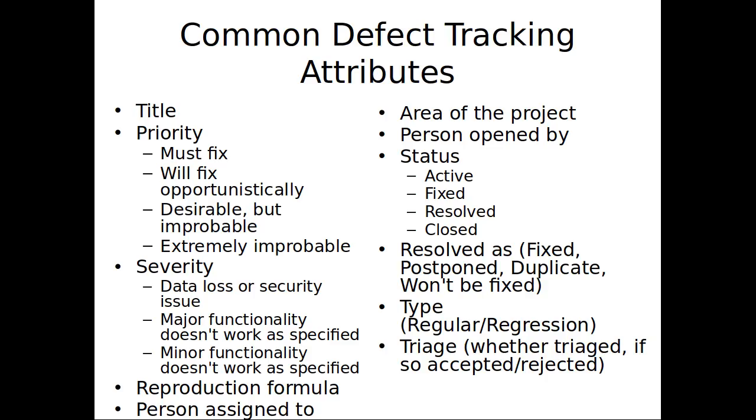So severity is the badness if it comes about. Priority takes into account both severity and probability of occurring. It's a little bit like risk exposure. Do you remember risk exposure? Probability times severity if it happens. Same idea here. So priority is kind of, are we going to fix this? And it considers frequency as well as severity.